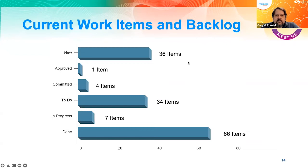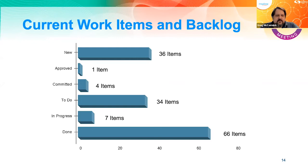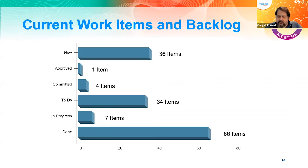Current work items and backlog: there are 36 new items. We go through new, approved, committed, to-do, in-progress, and done stages. There's one item in approved, four in committed, and 34 in to-do or in-progress, with seven done. The project is maintaining good backlogs so there's always something to work on.